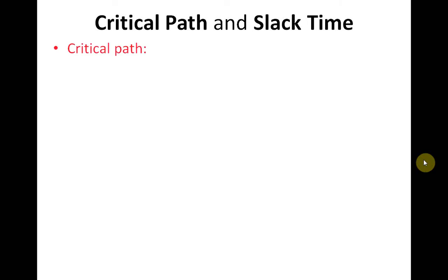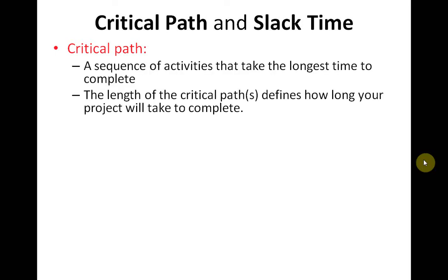Now let's see how to analyze the critical path. The critical path is a sequence of activities that take the longest time to complete. The length of the critical path defines how long the project will take to complete. And the non-critical path is a sequence of activities that you can delay and still finish the project in the